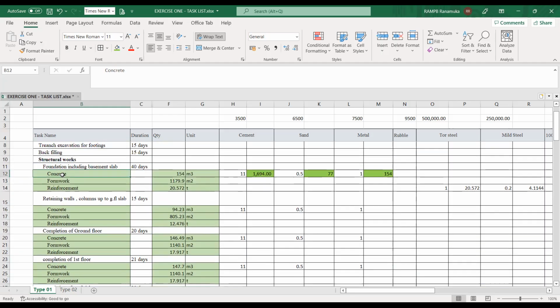So when you are preparing the program, just consider these things and include some more details. If you are preparing the BOQ based on SLS 573 or SMM7 or NRM2, we never prepare a BOQ for just a first floor. We always include all these activities, from concrete, formwork and reinforcement, every activity in the BOQ.